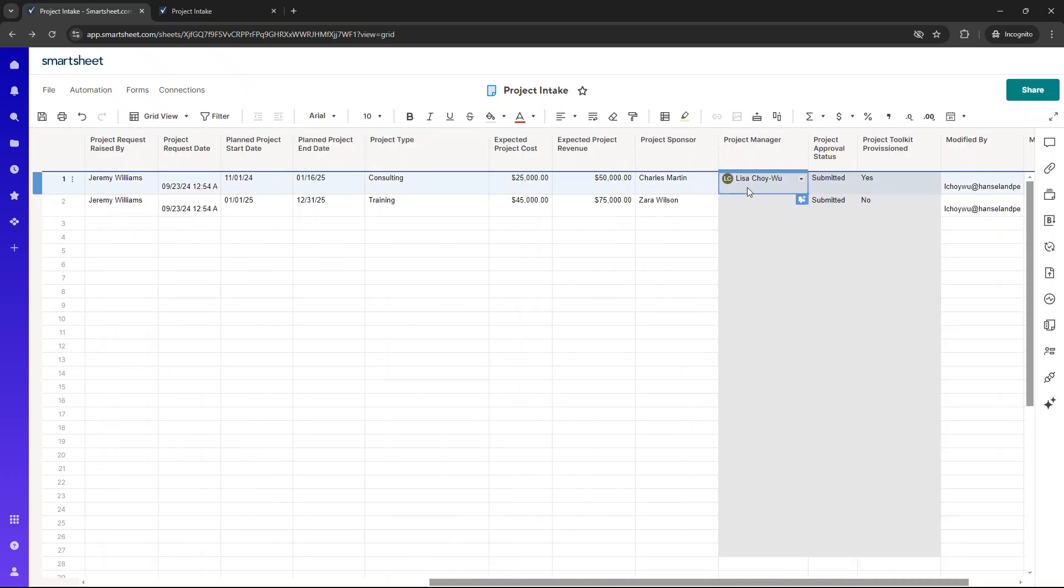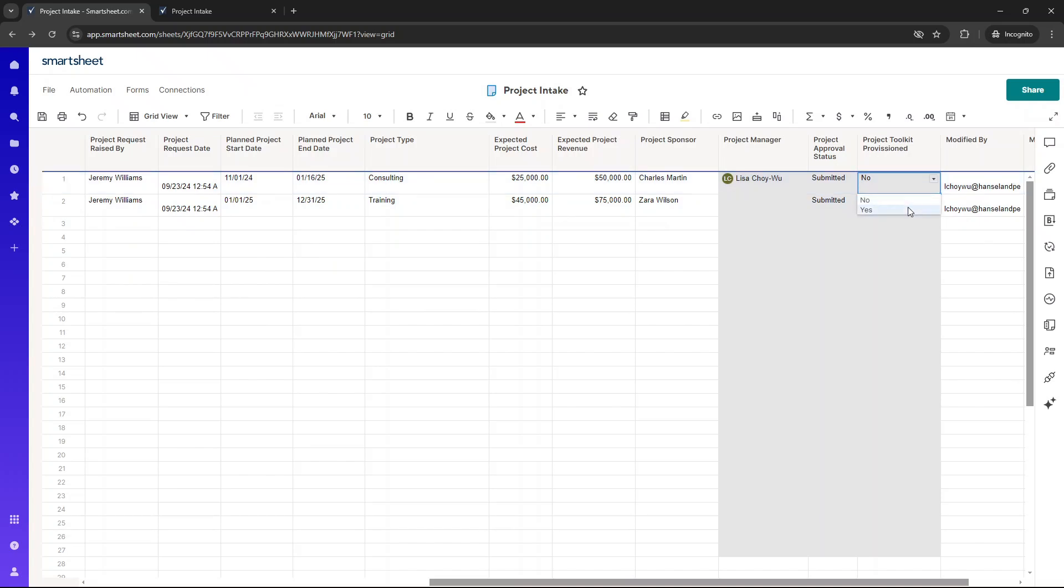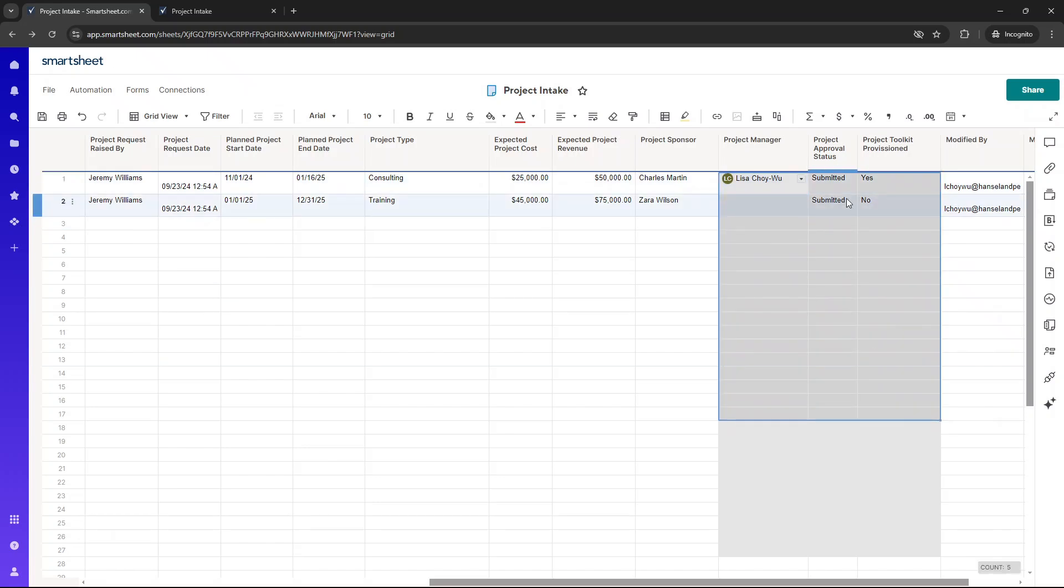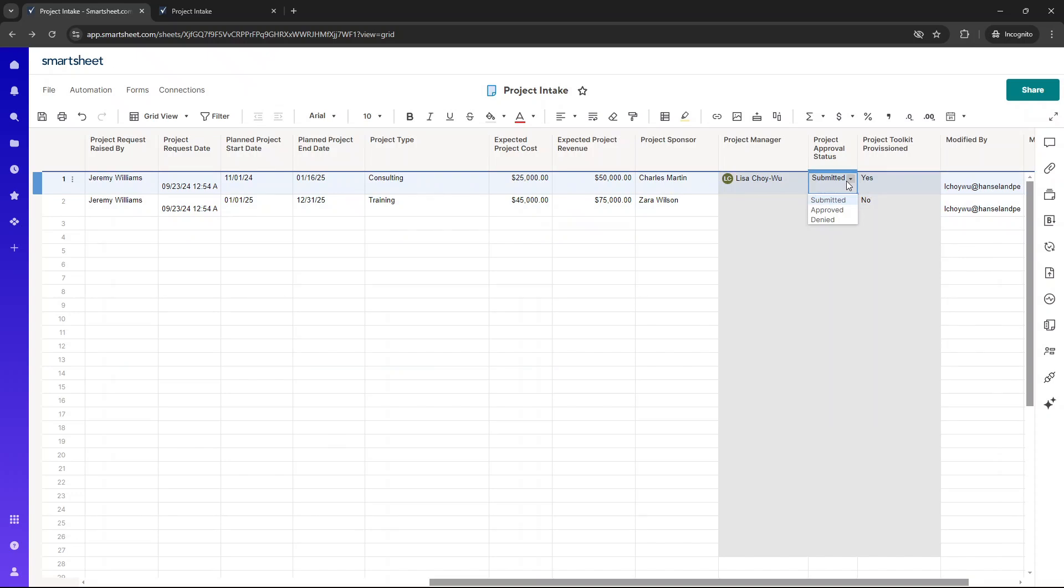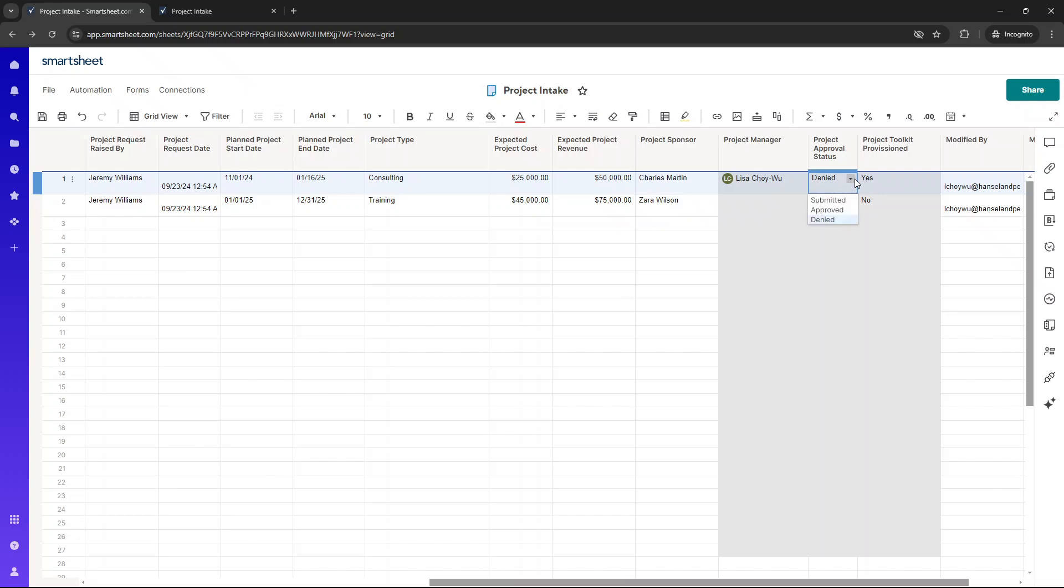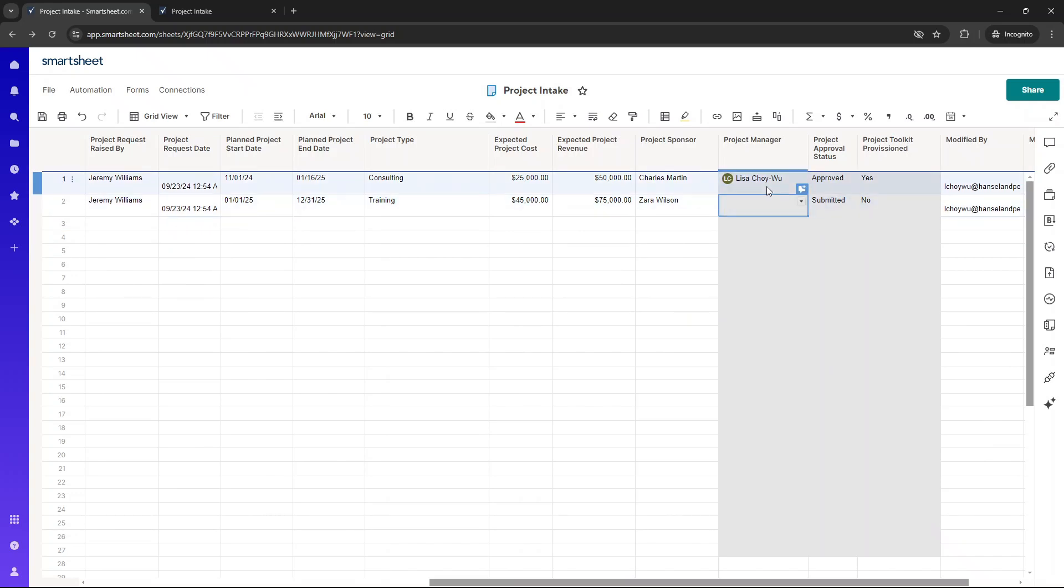And at this point, I could set up a project toolkit for her. And once that's done, once I've created that, I could then go back in here and press yes. So you get the idea. That's how this essentially works. These gray ones are your admin processes off the back of the request. So as an example, the approval status, let's just say the project request came in and it's a project that we can't undertake at this precise moment. We could put denied. And then we could go and send some communication to the project requester. You know, we didn't receive the right information. It's not a project that we have the resources for at this precise moment. You get the idea. If it's approved, that's when we can go and submit the, create the project toolkit. You get the idea on that.